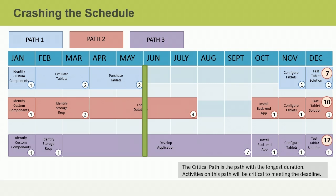The number of resources you add can be determined using parametric estimating. The more resources you add, the shorter the activity duration will be, at least until the point of diminishing returns. At some point, you will achieve the most efficient staffing level for the activity. Any more resources will not result in a shorter duration. Once you estimate the appropriate number of resources to add to this activity, you can determine the cost and update the schedule baseline and budget baseline accordingly.